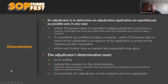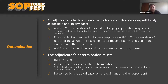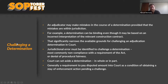An adjudicator is to determine the adjudication application as expeditiously as possible. The purpose of the Act is to get payment moving through the industry fast — that applies to claimants getting material on swiftly, respondents putting payment schedules on swiftly, and adjudicators determining quickly. The adjudicator must determine within 10 business days of the respondent lodging an adjudication response, or if no response is lodged, the period in which they were entitled to do so, or within 10 business days of acceptance of the application, or within another time agreed by the parties. The determination must be in writing, must include reasons, and must be served on both parties.